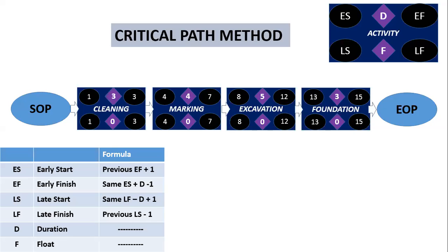Got it? What does this 15 indicate? You're having 15 over here in the foundation task. It is the number of days. That is the final day of the project. The 15th day is the final day of the project, and 15 days is the total duration of this project.